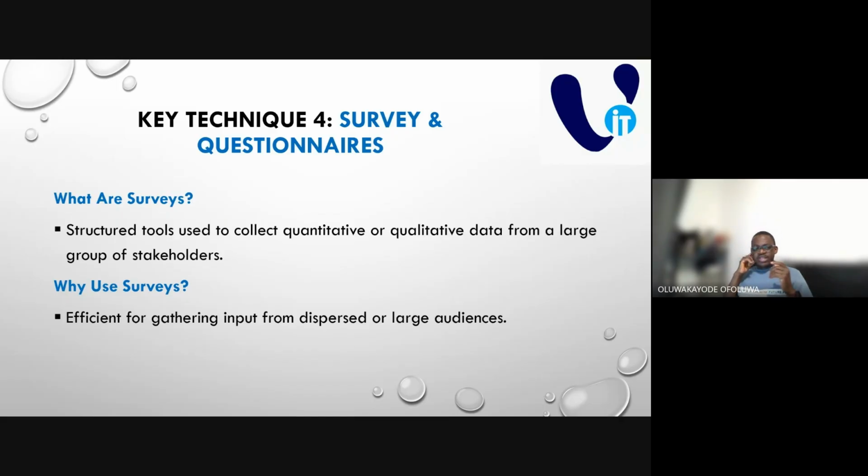Why do we use surveys? We use surveys for efficient gathering of inputs from a dispersed or large audience. When we say dispersed audience, we mean people in different locations and different time zones, people that we cannot easily gather into one location.